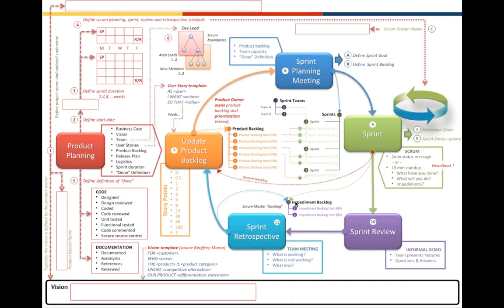It's a good question. So what we do is that sprint planning for the next sprint starts early. Okay, starts before the actual sprint starts. So let's say you're in sprint one, and your sprint is 2 weeks long. You may want to start planning for sprint two 3 or 4 days before the next sprint. You will not be just planning for sprint two, you will be doing the first sprint work, but you'll start doing the groundwork.